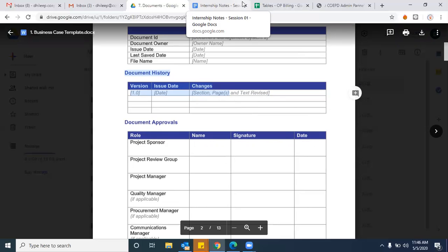As soon as the changes come. When the client is asking us to modify something in the document, you will go with the next version, 1.1. Again, 1.1 is sent for approval. Instead of approving, he shares a couple of things to add, then we will look into that. Again, you will get into 1.2. For example, 1.2 is approved. You don't need to change any document version. 1.2 is the approved one, right? So on the basis of 1.2, you should start working on the BRD. Got the point? After approval, you don't need to change the version.